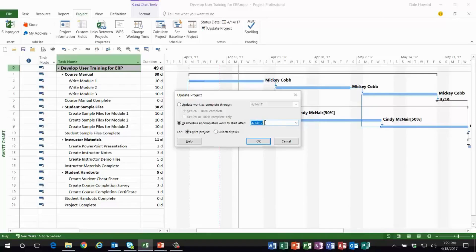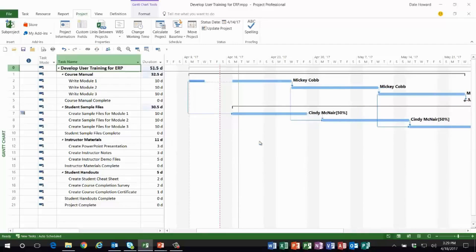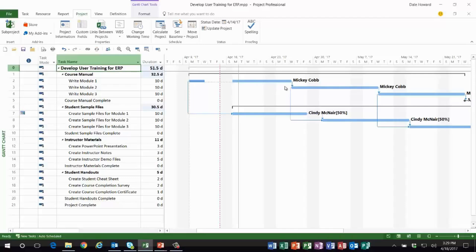in the status date for us automatically as a bonus, and then we click OK. So here's what Microsoft Project did: all the incomplete work from last week is rescheduled into this week, and the finish date for this task is delayed into the following week. For the task that Cindy was supposed to be working on,